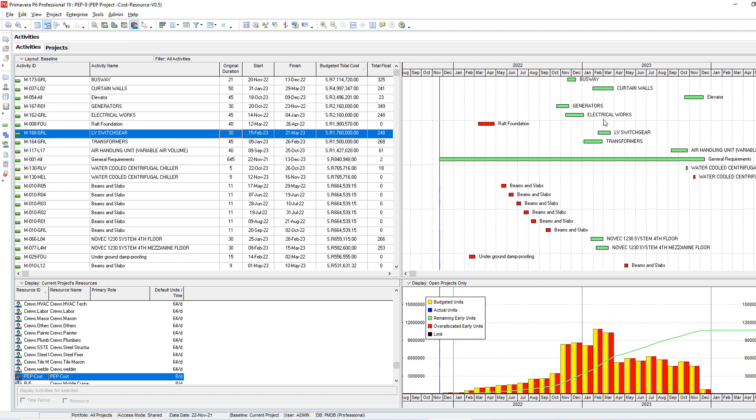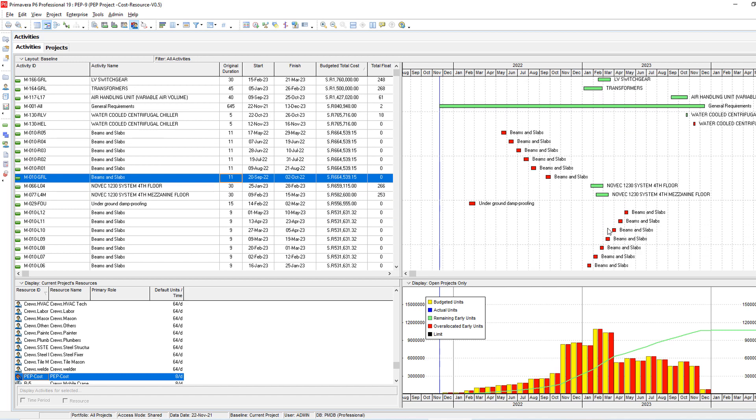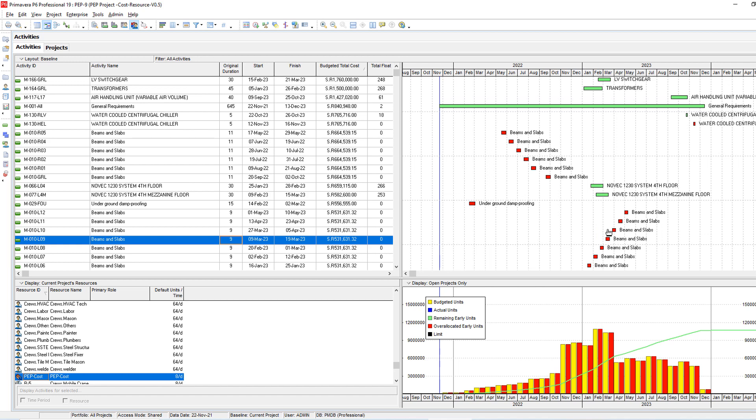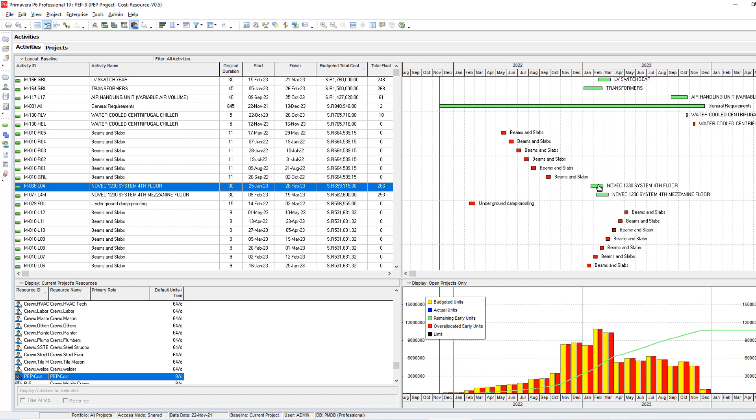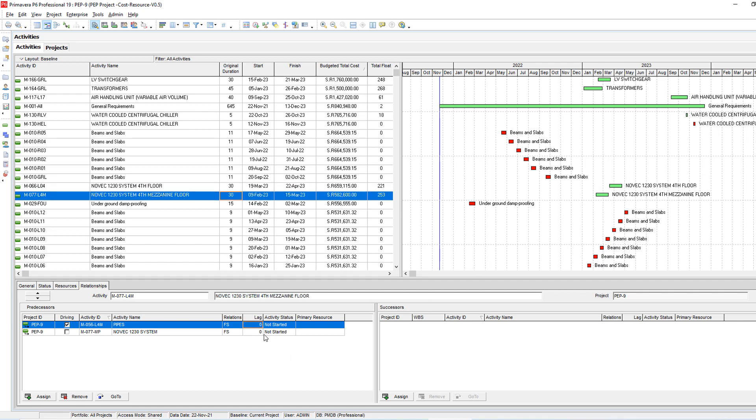Here, March. We can go down. For example here I cannot play, I cannot do anything because it is already critical. I have zero total float. In that case I need to reduce February and March. These two activities, it looks like they are linked together. Let's push them by one month.